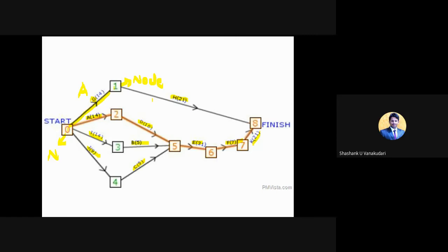So now what we have done, before finding out these, we need to note down all these activities. So how many activities will come, right? So here from A to K we have different activities. So that is the first part. And second step, we need to give certain durations for that. Such as for G activity, we have given 14, and for A activity it is 14, and then for B activity, which is 5, and C activity, again 5, and then D activity, 10. So like that, for each and every activity, we are giving certain durations, depending upon the type of the work. Okay, and that is the second step.